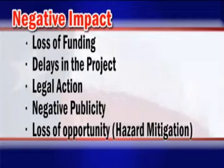such as hazard mitigation. Regarding insurance, the applicant should be aware that actual or anticipated insurance proceeds will be deducted from the eligible project cost for facilities that are insured. The applicant is required to obtain and maintain insurance coverage on all insurable facilities as a condition of PA funding. Deductions will also be made for flood-damaged facilities located within a special flood hazard area if the facility did not carry flood insurance at the time of the disaster.